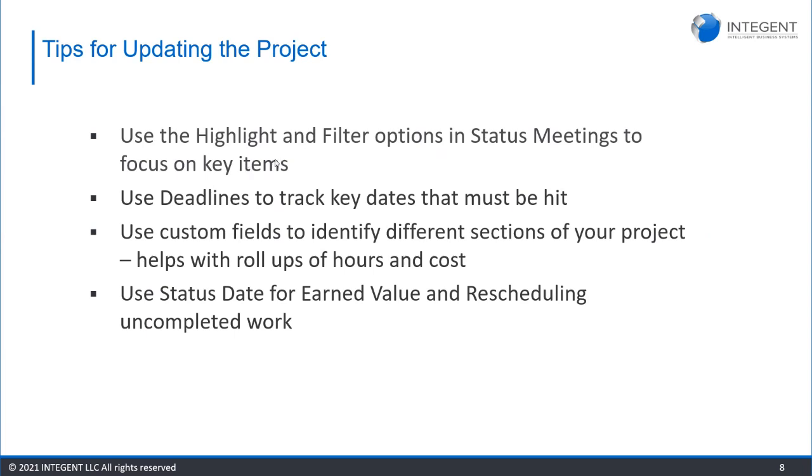And if you have any task level custom fields, you can use group by as well. Several of the examples we'll go through here will use those custom fields to give you more information about your schedules. If you're working in Microsoft Project locally, not in an enterprise environment, you can add custom fields to your schedule at the task level at any point. But if you are working in an enterprise environment, then I would definitely recommend working with your admin to have those added. That way you have the ability to group, filter, and highlight based on that additional information.